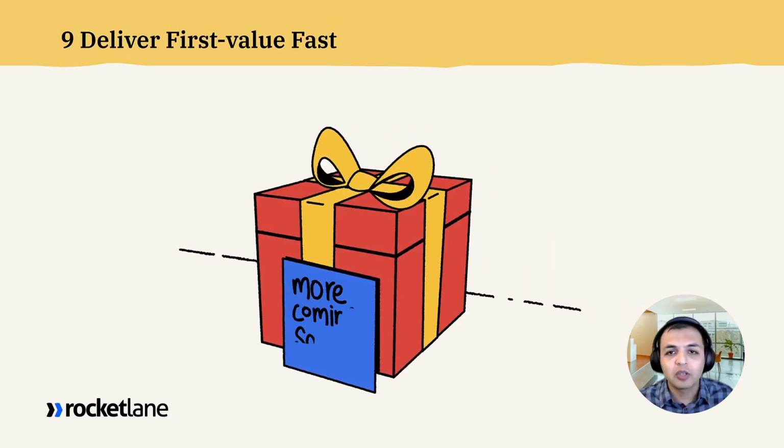The ninth thought we wanted to share is focus on delivering first value faster. Ensure that you're breaking down the project the right way and not aligning all deliverables towards the end. Instead, you're doing things iteratively and you're figuring out how you can get the customer to start seeing value faster. You may not have all the integrations complete, but still, if there's some value for individuals working on your software, try to go live with that and then add those other integrations. Don't make it all or nothing, with customers waiting for things to happen.